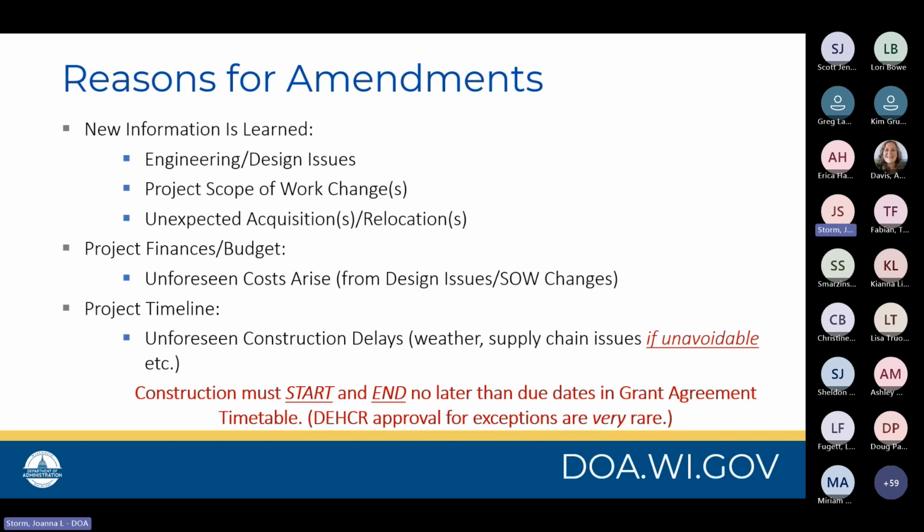Many times as well, we recommend starting the bidding process early. Since the pandemic, building and construction costs have risen quite a bit. So you may often find that your initial estimates for what a project was going to cost may be blown out of the water. So just bear that in mind. Also, for project timelines, there may be unexpected construction delays related to weather, supply chain issues quite often.